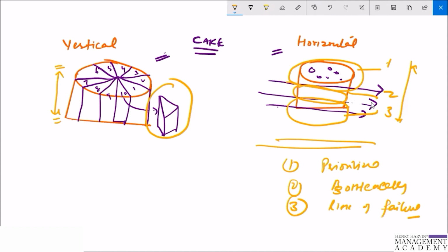So that is the reason in Scrum a vertical breakdown is more useful, in which user stories are broken down into smaller user stories. If user stories are broken down vertically, they are broken down in such a way that the smaller items still result in working, demonstrable software, and the functionality will not be split across technical layers or tasks, but across the functional layer.